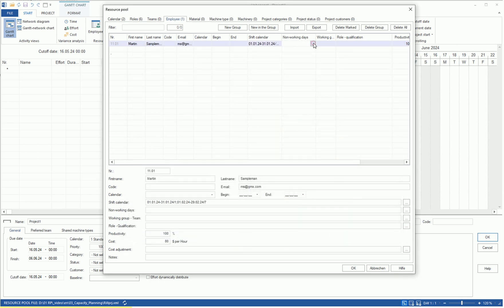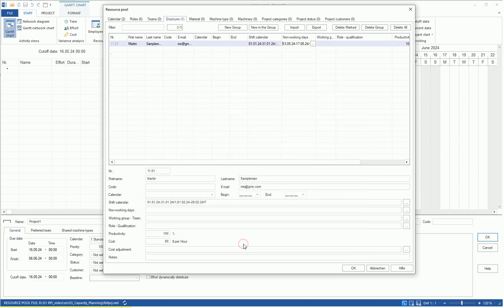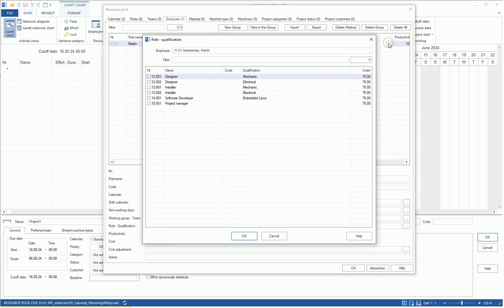Now, we move to the non-working days column. Here, you can enter non-working days such as vacations, training, or sick leave for an employee by clicking on the three-dot area and marking a period in the calendar. You can also mark the type of leave with a letter, for example, H for vacation. In the role qualification column, we assign a professional qualification to employee Sampleman.